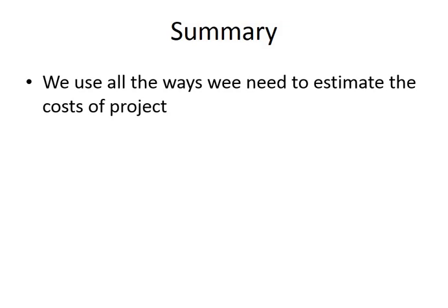If we want to just compare different alternatives, different ways of solving our problem, then this descendant cost estimation showing more or less how much it is going to cost is enough. If we are planning exactly what we are going to do, if we are sure what we want to achieve, then we prepare more precise cost estimation, and this is done with this ascendant way.